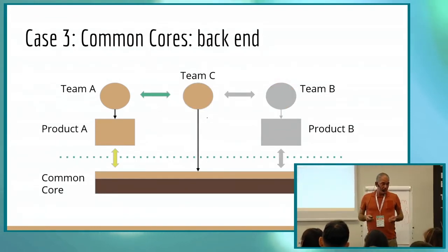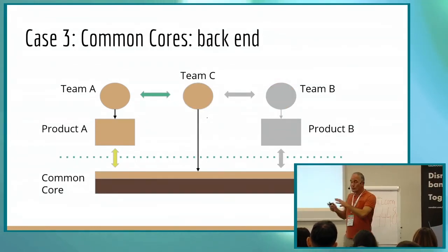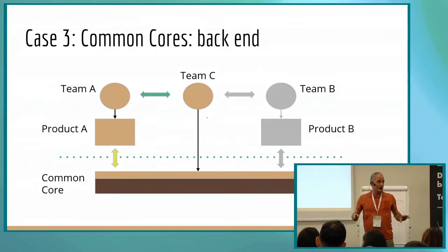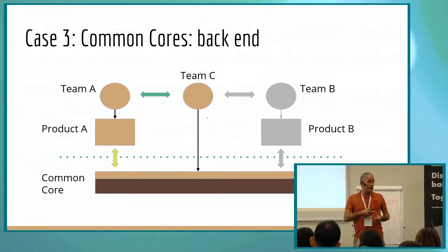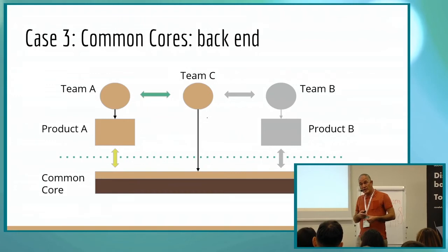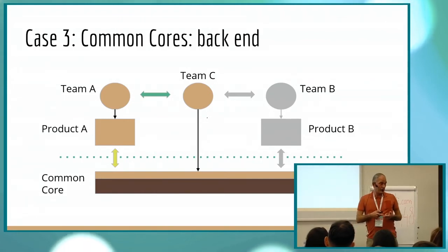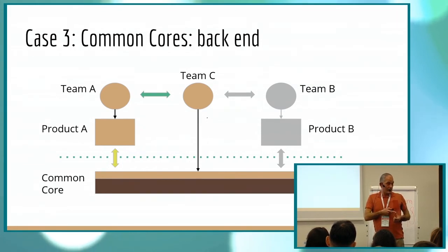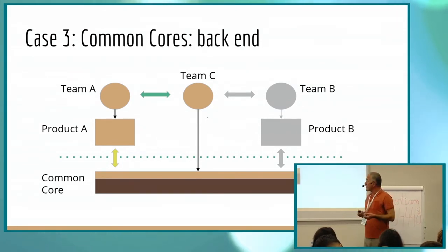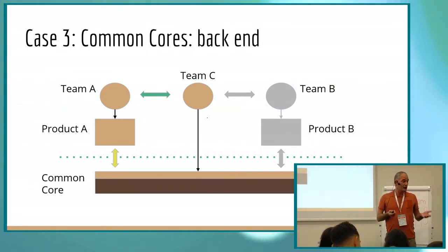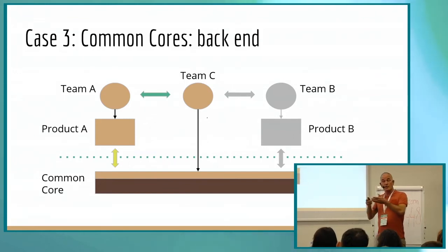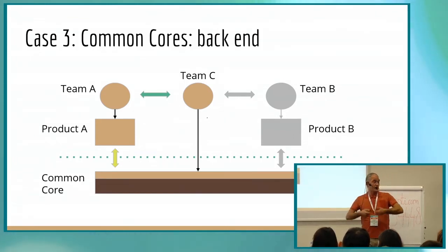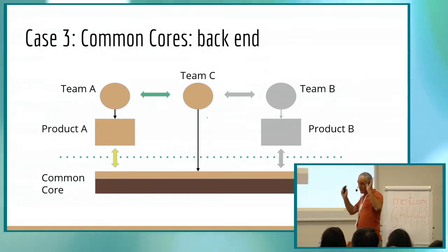Now create a platform, a new team that does this shared code. This team will have its own backlog, meaning that what is shared will have its own backlog. So there is some transparency on what is planned. A second is, if you need to negotiate over features, there is a product owner for the shared code. Rather than two product owners of teams fighting with each other, there is one who says, well, this is my domain.